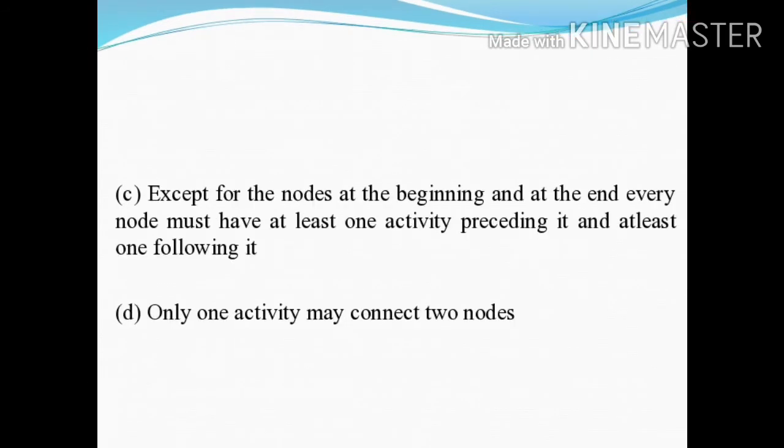The third rule is that, except for the nodes at the beginning and at the end, every node must have at least one activity preceding it and at least one activity following it. The fourth rule is that only one activity may connect two nodes.